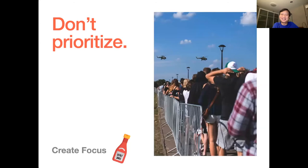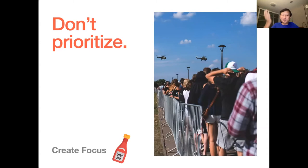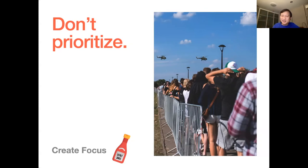Also, don't prioritize everything. This might shock a lot of people, but when you start learning scrum or agile in general, you learn to prioritize — as a product owner you stack-rank your product backlog. But once you start growing your backlog, you do a lot of work to keep everything in a nice order, which gives the false impression that you have everything planned all the way to the end. In a way, this is big planning up front all over again.